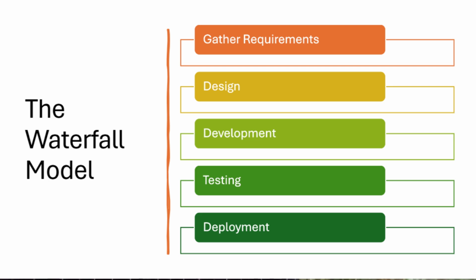Now, this sounds disciplined, right? It's perfect for projects where requirements are crystal clear, like developing payroll software or a railway reservation system. But here is the catch. If the client changes their mind midway, it's like trying to push water back up the waterfall. Painful and expensive, right?